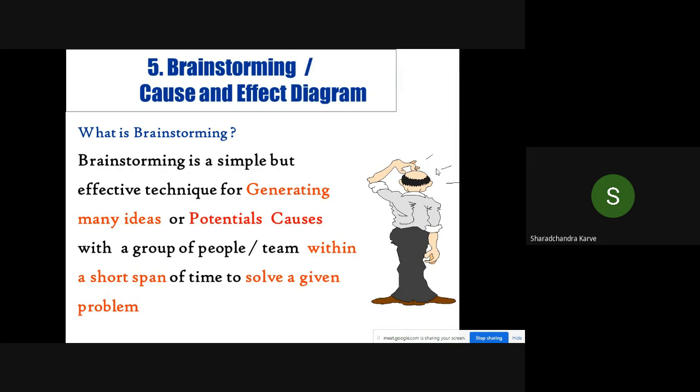If you come out with a very good idea and you rate it on Q on a 0 to 10 scale, probably you say my idea is very good, it is 10 out of 10 on quality. Fantastic idea I have. But what is the acceptance of that idea? If it is only 3 on a 1 to 10 scale, then you reach an effectiveness of 30%. If your idea is 7, but your acceptance is 7 out of 10, then you reach an effectiveness of 49, which is more than 30. So what is important is the acceptance of the idea.